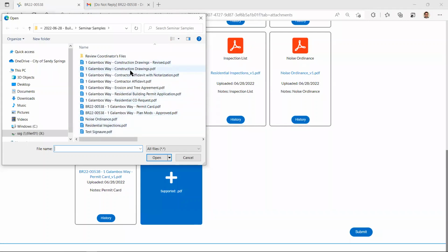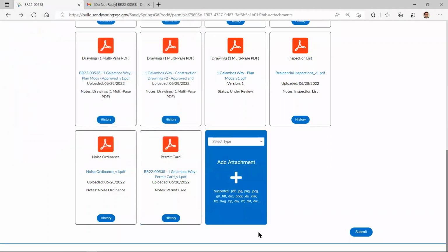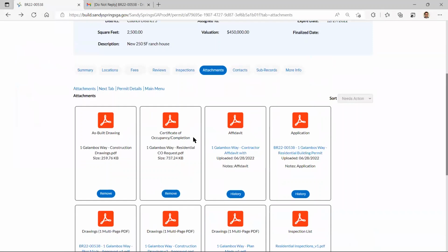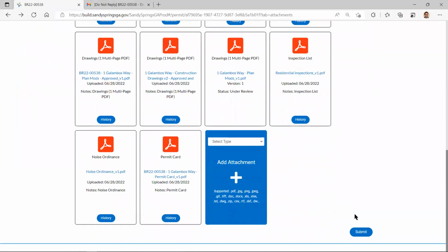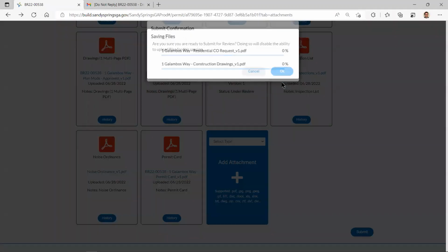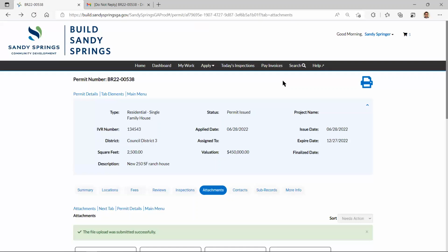Well, let's just grab one. All right, now I've also uploaded an as-built, and when we're done with that, we're gonna say, yep. It's just a straight survey, right? Key things to note on the as-built though are, it's a straight survey, but you also need to include on the as-built your updated lot coverage calcs.